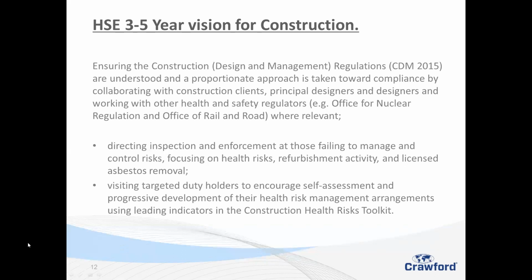First thing, we've got the person who's instructed you, which will be the client. If you're just there on your own reconnaissance, in other words, you're not employing anybody else, then you will not need a principal designer. You'll be able to do that as a principal contractor. What I would say is make sure you're qualified and make sure you provide the suitable certification to go with that.